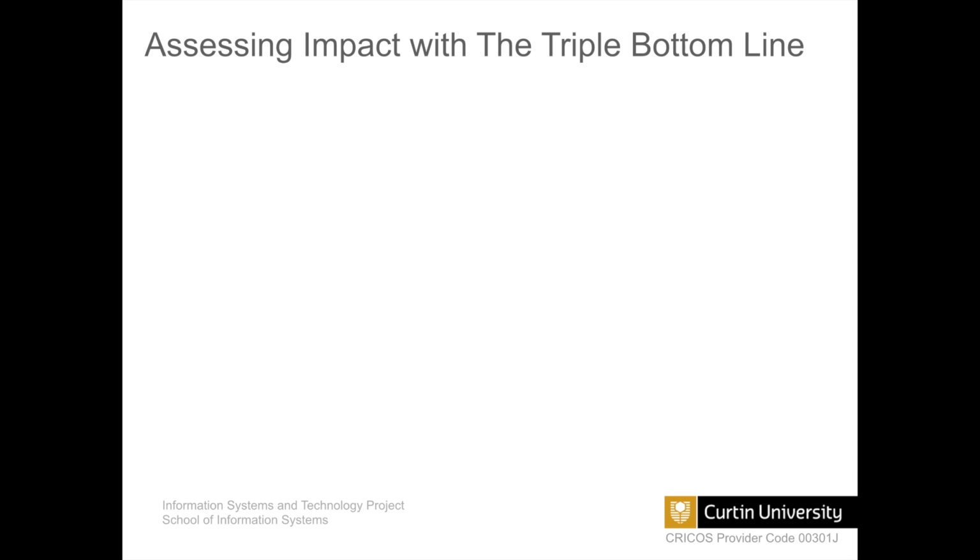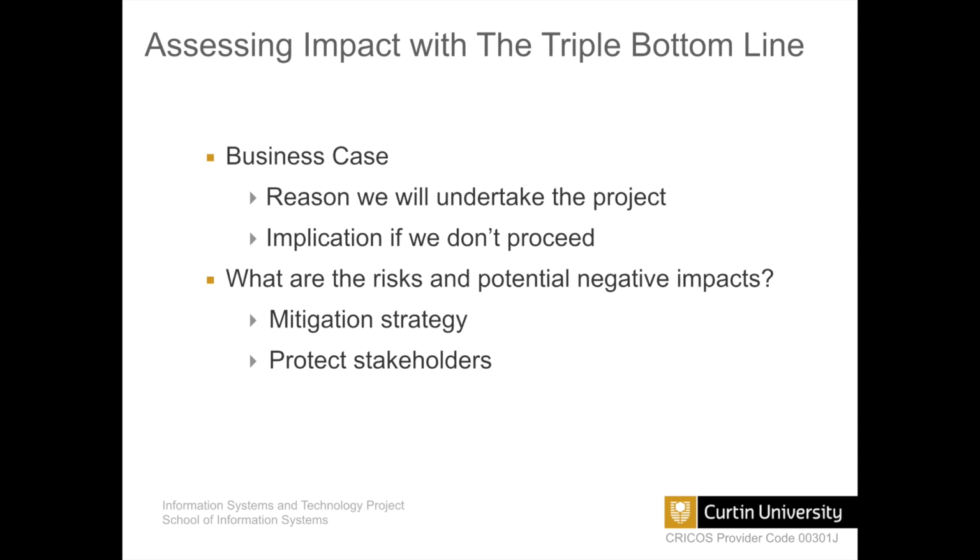As ICT professionals, it's common practice to develop a project charter that makes a business case for the project and considers potential risks before the project commences. The business case describes the benefits of undertaking the project as well as the implications of not proceeding with it. The terms benefit and business case both suggest describing the positive impact that a project will have. However, as professionals, it's also very important that we consider the potentially negative impact of a project and the means by which we'll mitigate against these to protect the interests of stakeholders.